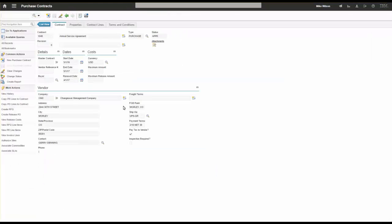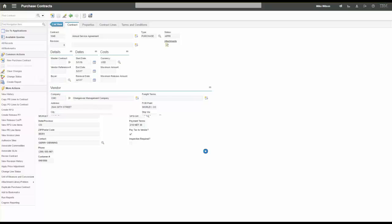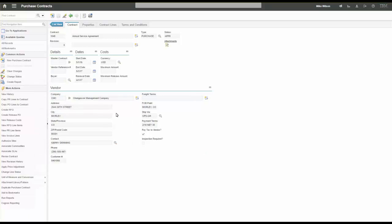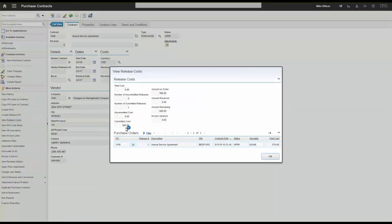Jumping back to the contract and viewing release costs, you'll notice instead of being uncommitted, it's now a committed release and the committed cost is the amount. Because we have an approved purchase order, this is an external commitment with the vendor — they can go ahead and provide those services.